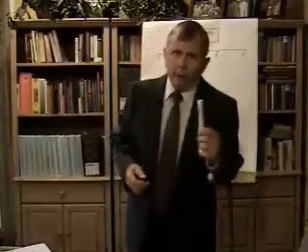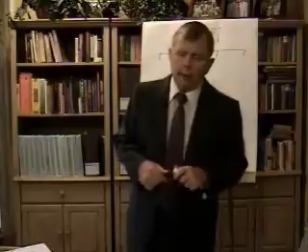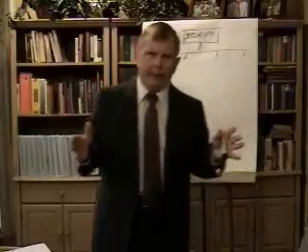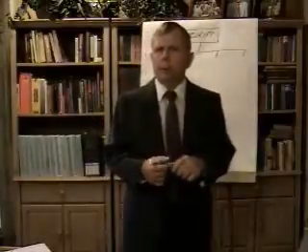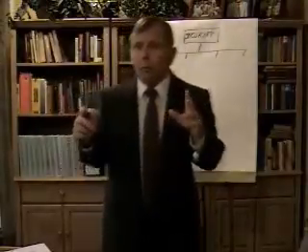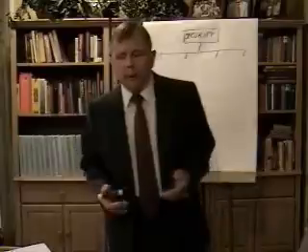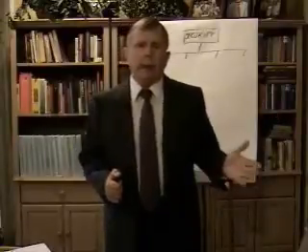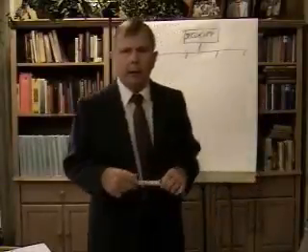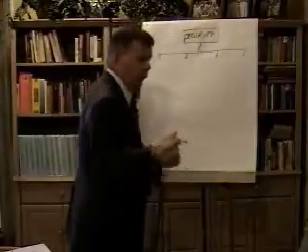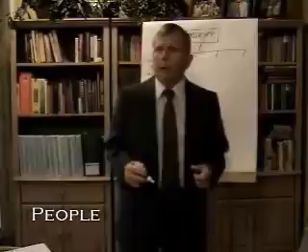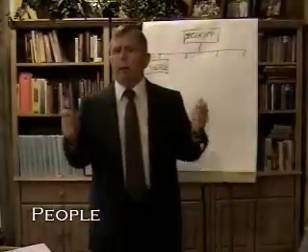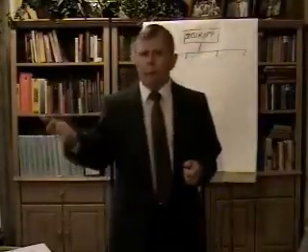Now, breaking this work breakdown structure into elements so that we can assure that the contractor understands what it is that they're supposed to do. I'm arbitrarily, and this is normally how we would break down the requirements, breaking it down into 4 elements. The first one being people. The contractor would have to have some amount of people performing different functions.